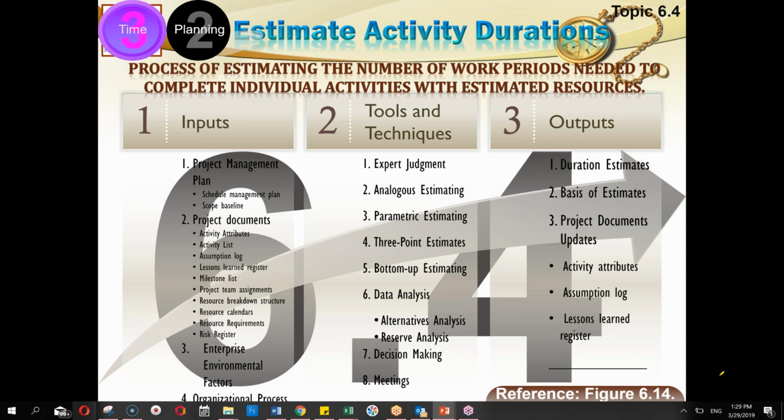Similarly, I may know that a person can do the earthwork this much, say 6 cubic feet of earthwork he can do in a day. This is the rate. So how much can a single person do in 10 days? This is parametric. So I will multiply his daily performance with 10 days and find out from this parameter the exact estimate for that job.